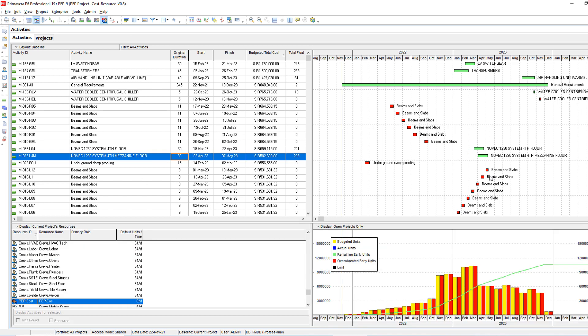Now it is March. Let's make it 45 days and this one also I'll make it 45 days. Let's see our graph how it looks like. Now we have a uniformed cash flow better than the shape we had before.